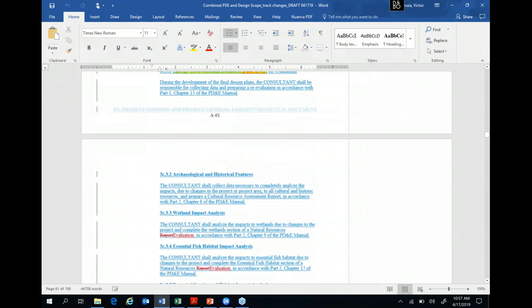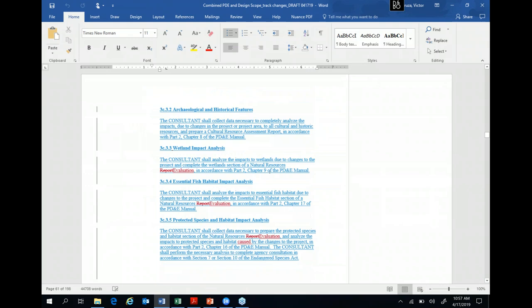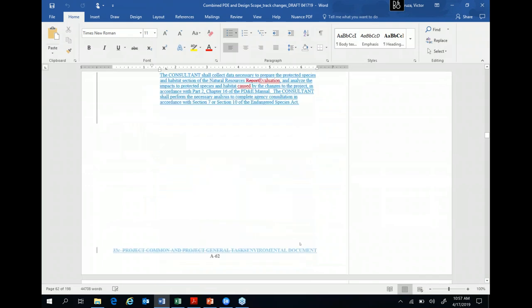Environmental documents — Section 3C — will be either a Type 2 CE or an environmental document (SEER); you must pick one depending on the federal nexus. Planning consistency will continue to be prepared and has been moved from engineering analysis into the environmental document section, since it is a documentation requirement. We also added PD&E re-evaluation with clarified language, and identified the types of issues most likely requiring re-evaluation.